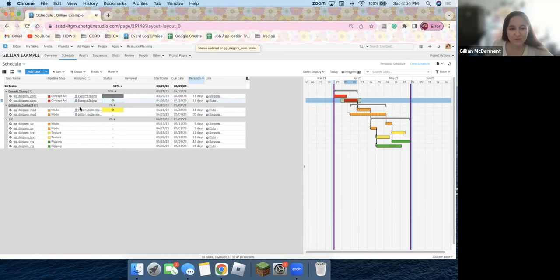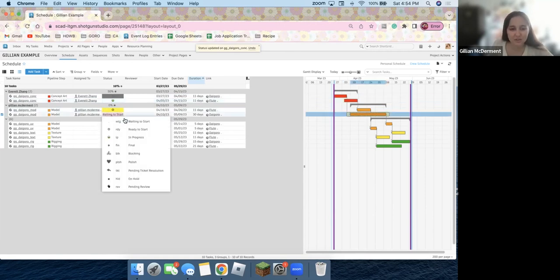So yeah, those are the few statuses I tend to use. Waiting to start means something it's depending on isn't done yet, so it can't start. Ready to start means the thing it depends on is done, which means I can start working on it. In progress means it's in progress, and final means it's final. These are other ones you can use, but I typically don't use them.